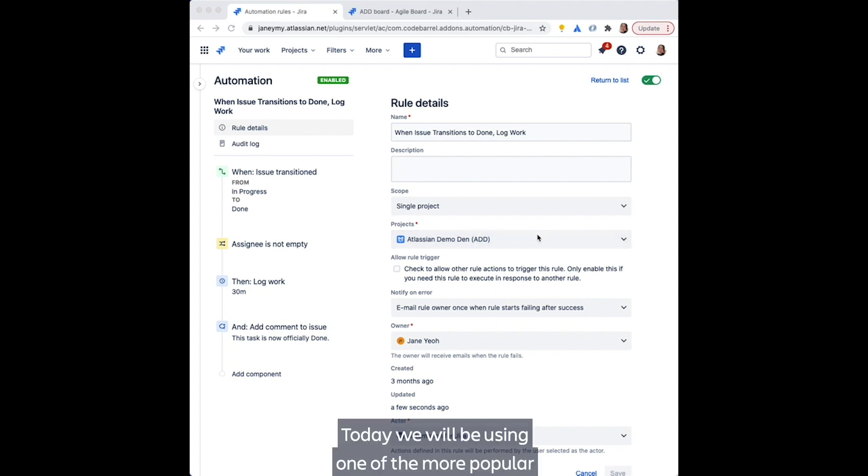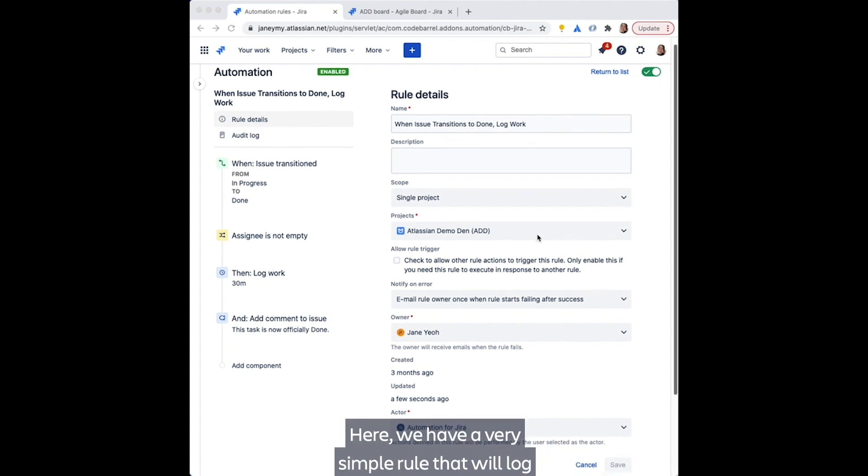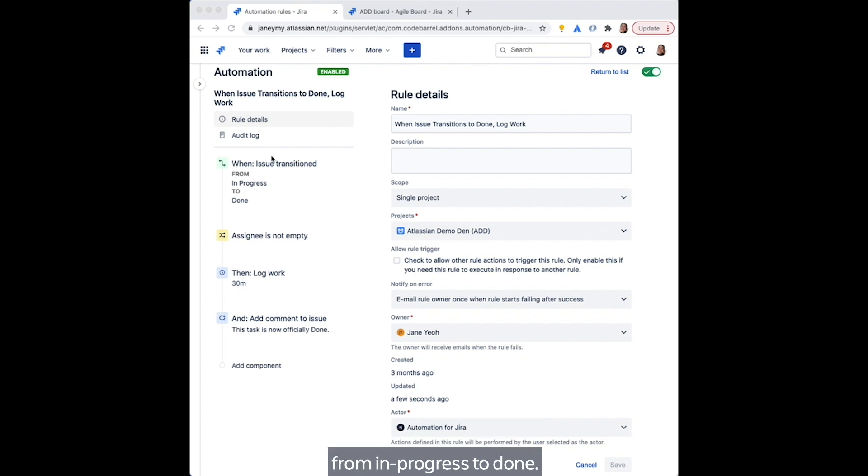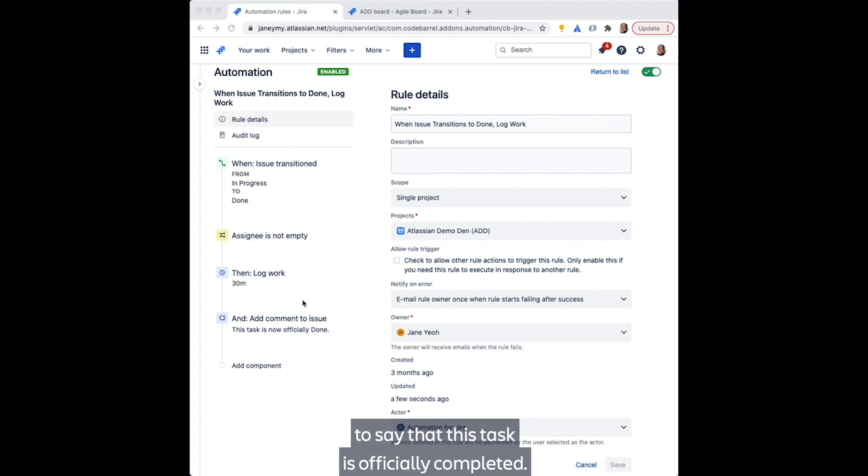Today, we will be using one of the more popular use cases to demonstrate how this might come in handy, but you can pretty much use this for any rule that you want, within reason. Here, we have a very simple rule that will log 30 minutes of work once an issue has transitioned from in progress to done. We are also going to add a quick comment to say that this task is officially completed.